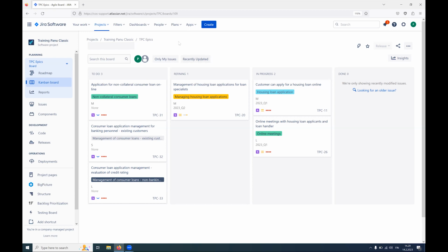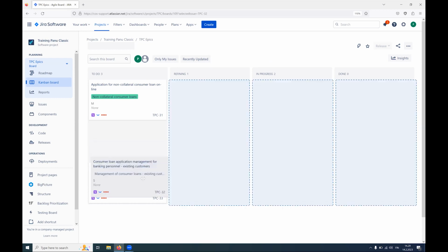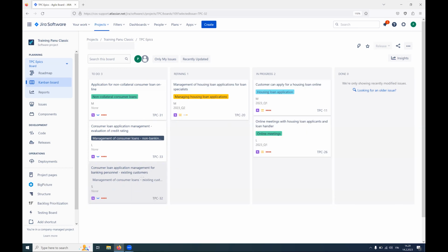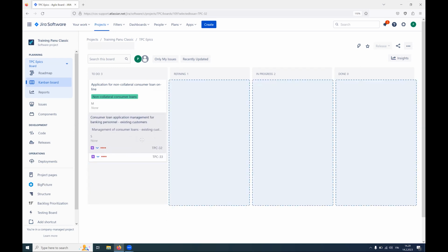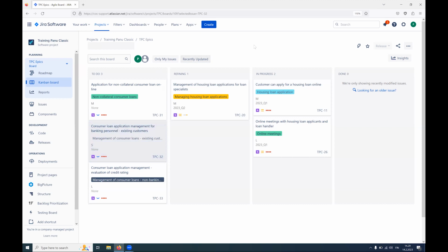Yeah, and one important thing here is that even if this is not the normal backlog view that you have probably used from the Scrum teams, we can still prioritize these. We have the ranking where we can put the order of these, and they should be in correct order, so that the top item in this column is the most important and so on. Once again, it makes it easier to read and prioritize and discuss the items. Exactly.